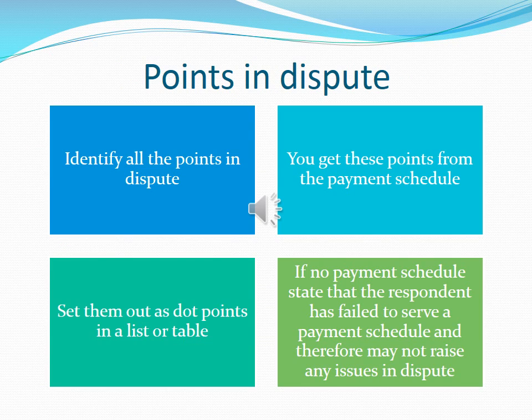Points in dispute. Once you have detailed and explained your payment claim, you have to deal with any specific points the respondent has raised. You may feel you have already addressed them in the previous section when you explained your entire payment claim. Even if this is the case, you need to still specifically address each point the respondent has raised. Naturally, if there is no payment schedule, you do not need this section in your submission.